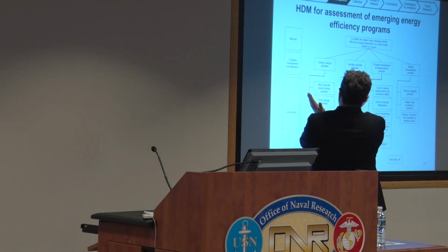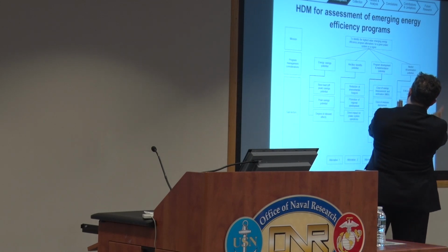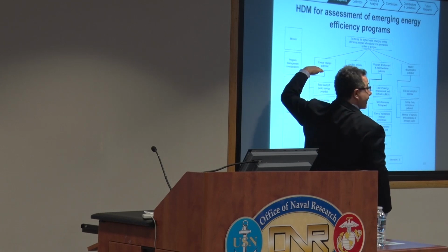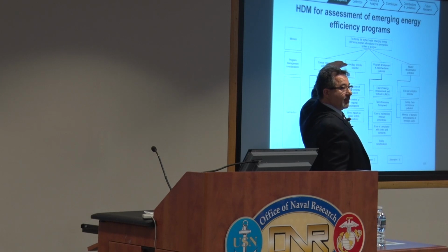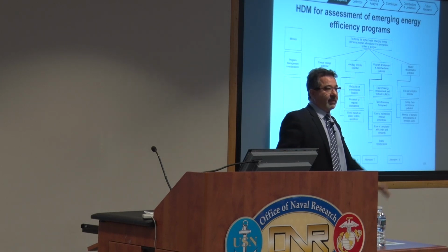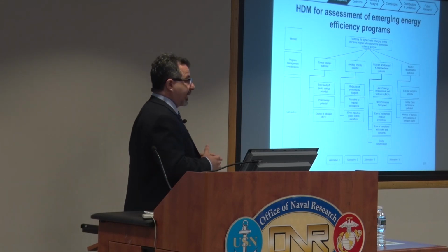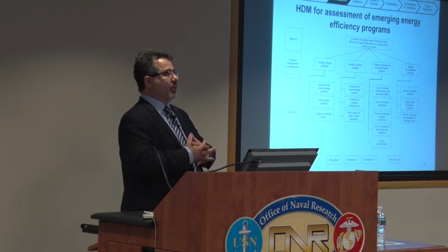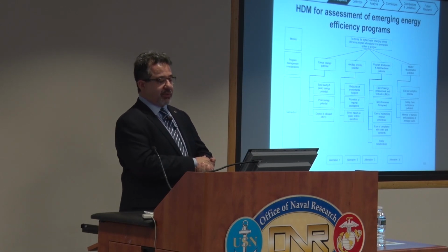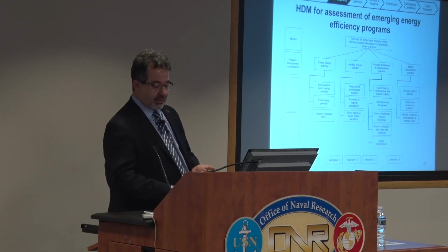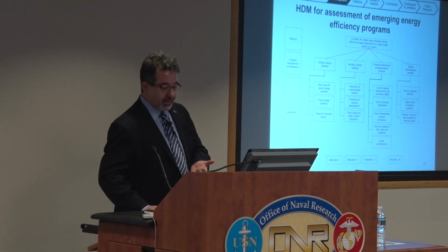For example, here we had experts on energy savings potential, ancillary benefits, program management, and market dissemination, as well as experts that understand different hierarchies. Executives can give us judgments at this level, engineers can give us judgments at that level, right? What they do is they compare items two at a time, a method called pairwise comparisons, and in that way we identify the weights. And of course we use different metrics such as inconsistency analysis, disagreement analysis, and so on and so forth to make sure the model is robust.